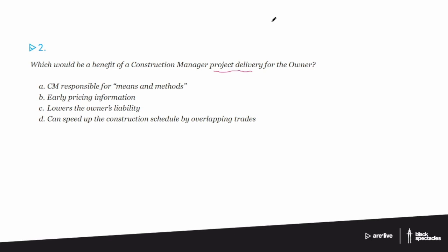That's where the owner, the client, hires an architect, they negotiate back and forth about schematic design and into design development, and then eventually the architect finishes out the contract documents, prepares a bid set, sends it out to a number of bidders, and then those bidders all bring information back. One bidder is chosen, they then become the GC, and it goes on to build the project. That's a sort of tried and true, long-standing way to do it, but it also takes a long time and has certain disadvantages. There are obviously certain advantages to it as well.